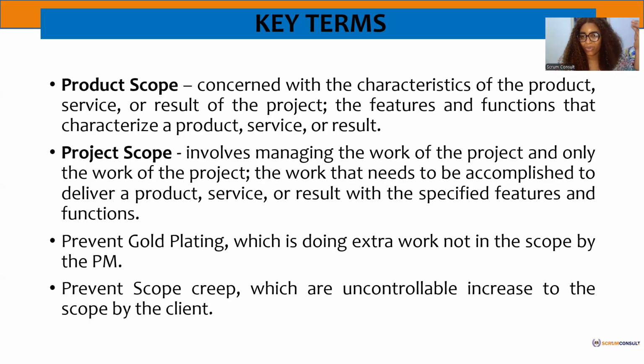Don't forget that before a project was initiated, you had done what we call business justification, which is justifying the reason for the project, validating that need, verifying that need, and you all came to an agreement that we should create that. If the scope keeps getting expanded uncontrolled, it can make you miss out or misalign with the project vision. And this is how projects fail. When you see people say projects are no longer viable, it's because the scope has been uncontrollably increased. And as such, as a project manager, you need to watch out for that, please.